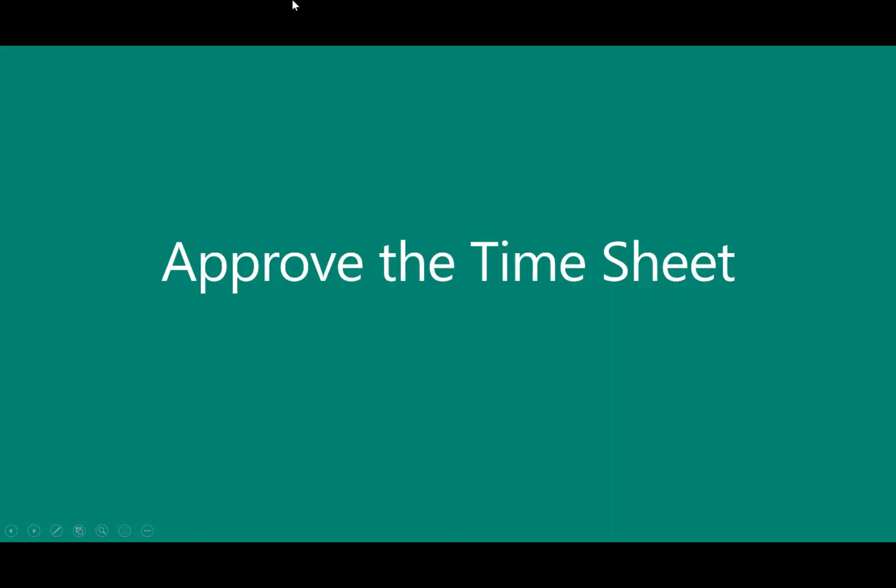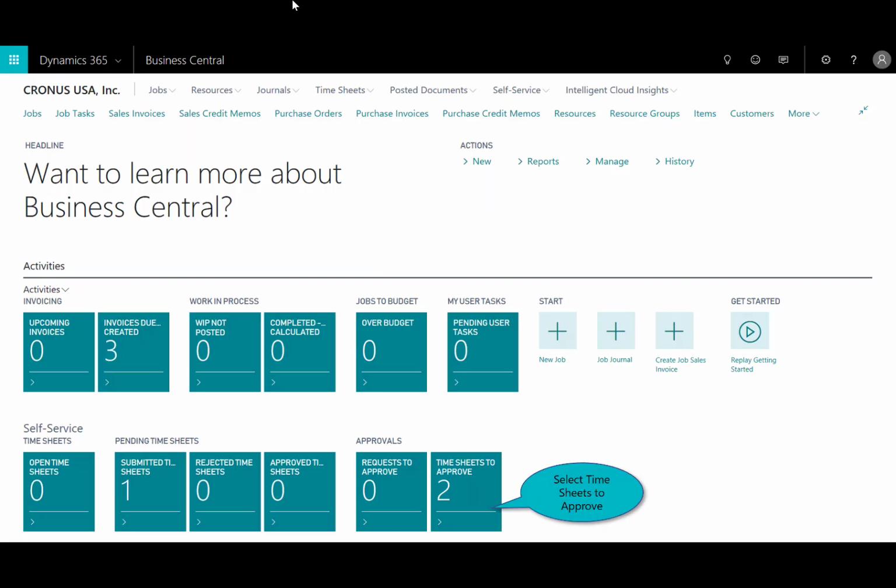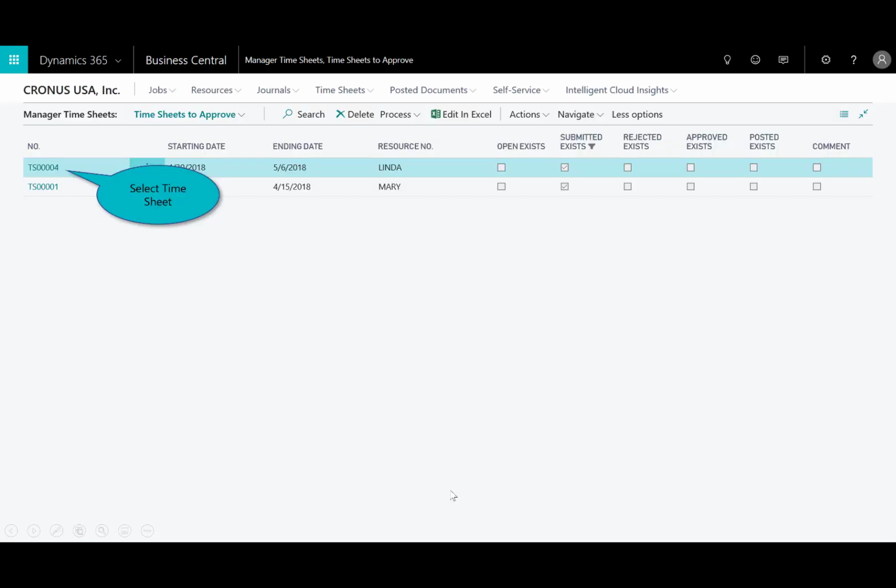Next, as the on-site consultant, they've already submitted their time associated with a job and a specific task. The project manager then has the responsibility to approve their time, which in turn would trigger all the accounting policies to bill that client. So you see here too, first of all, there's no longer an open timesheet. You'll see the timesheets here. Now I have two to approve.